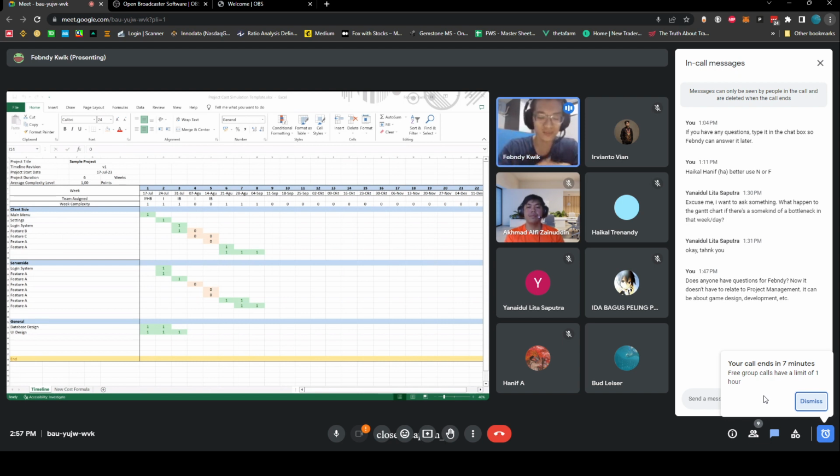So, for example, inventory system is one module, but where does it cut? We can say perhaps characters could be its own module, like the stats and so on, but inventory could be its own module. The connecting point for that is going to be the items, right? So first you're going to work on the characters, and then the items, then the inventory. So inventory is codependent on that. But items and characters are two separate modules. You can do that in parallel, I think. Items work on their own, characters work on their own. But inventory is that one module that connects the two of them. Does that make sense?